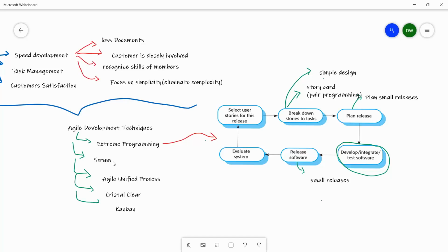In Scrum, we have a number of tasks to be done within a given Scrum period, and a Scrum is a fixed time period of about 2 to 4 weeks, right? There is also a cyclic process in the middle of a Scrum, and thereafter, whatever drawbacks, problems and modifications you identified within each Scrum will be used to develop your software within the next Scrum, right?